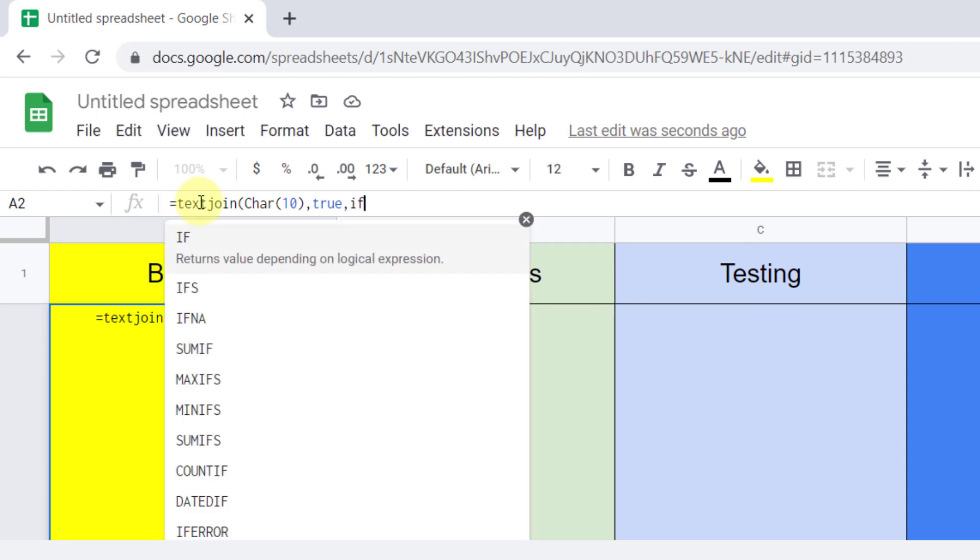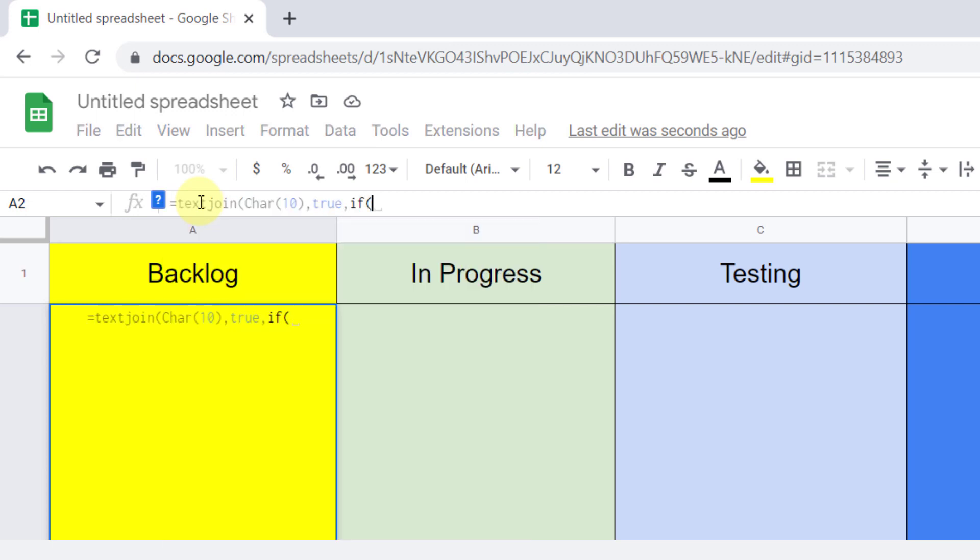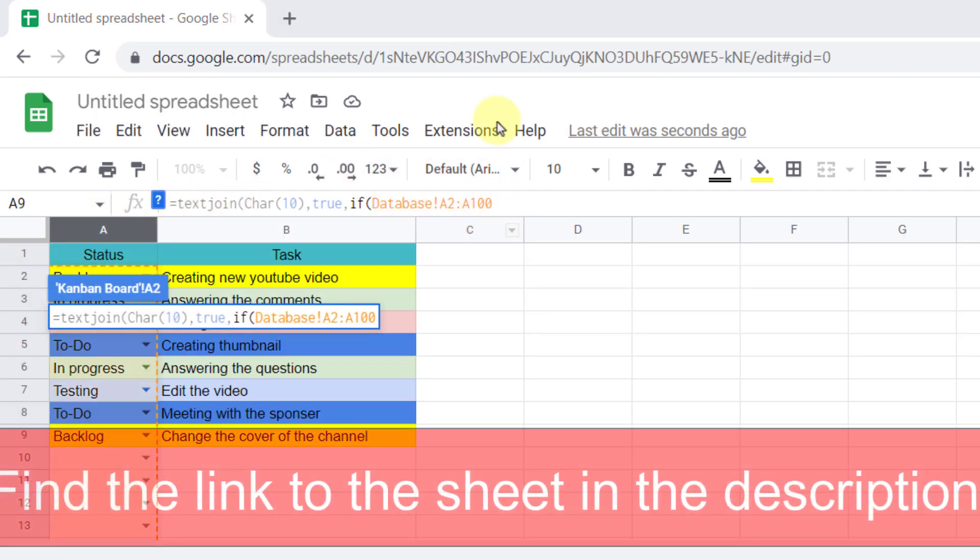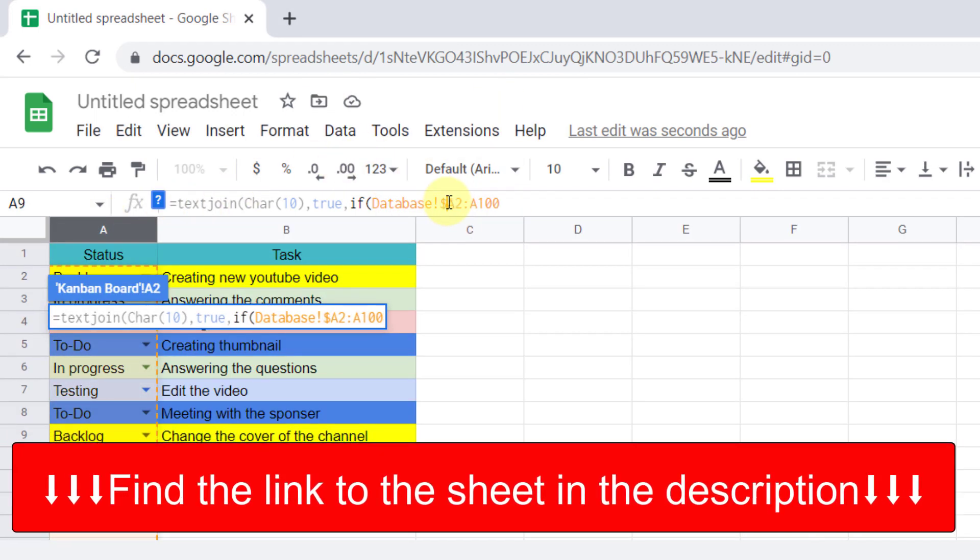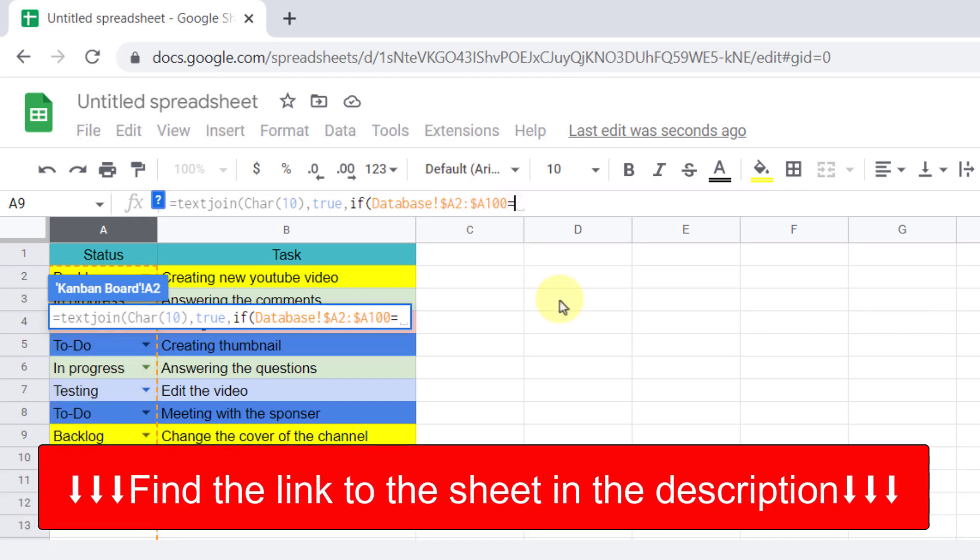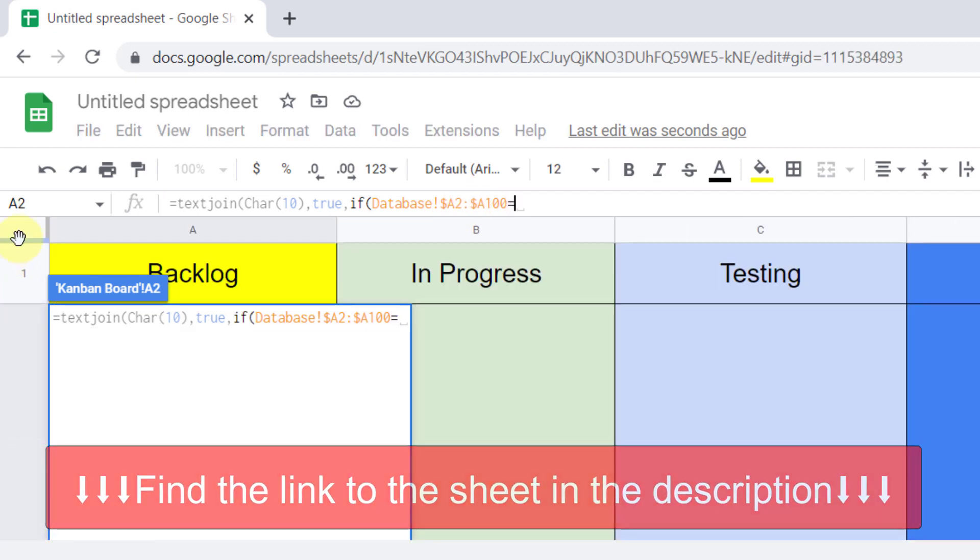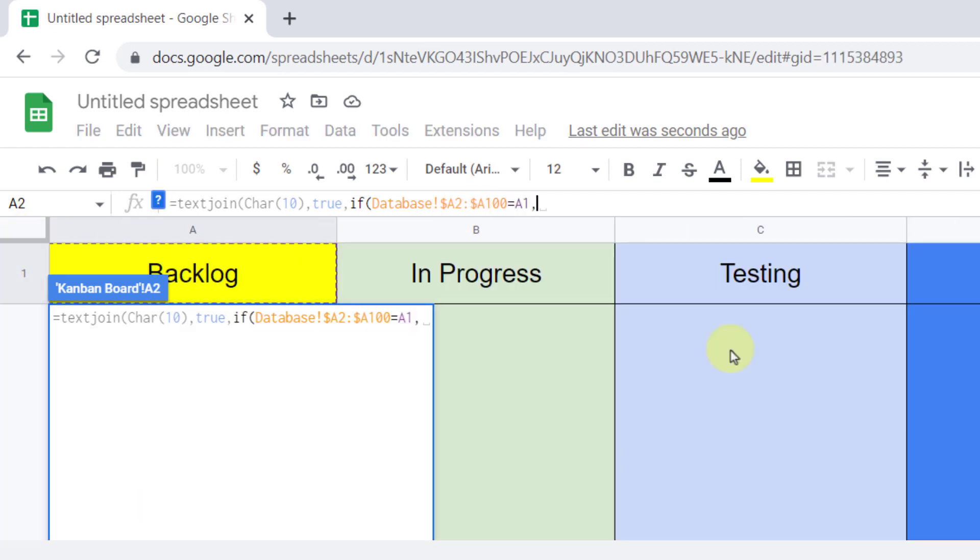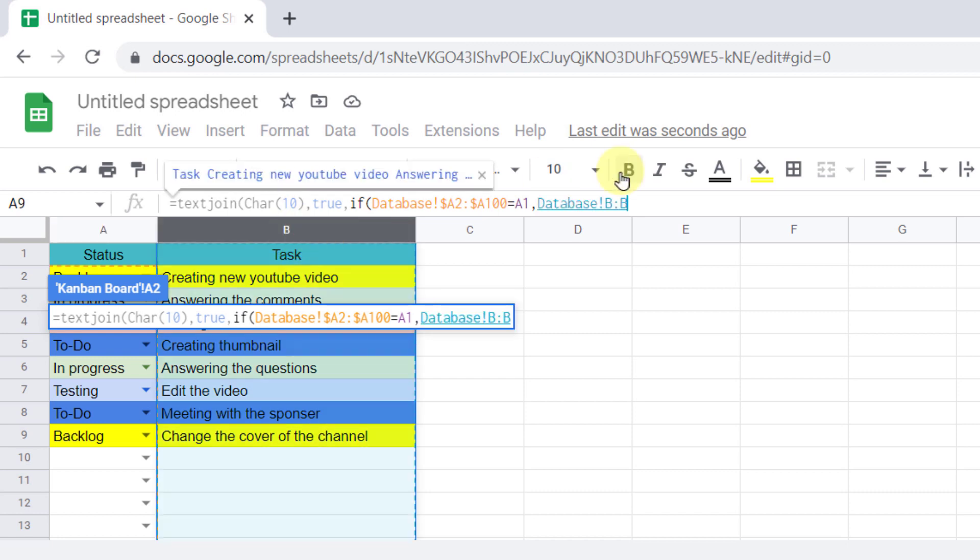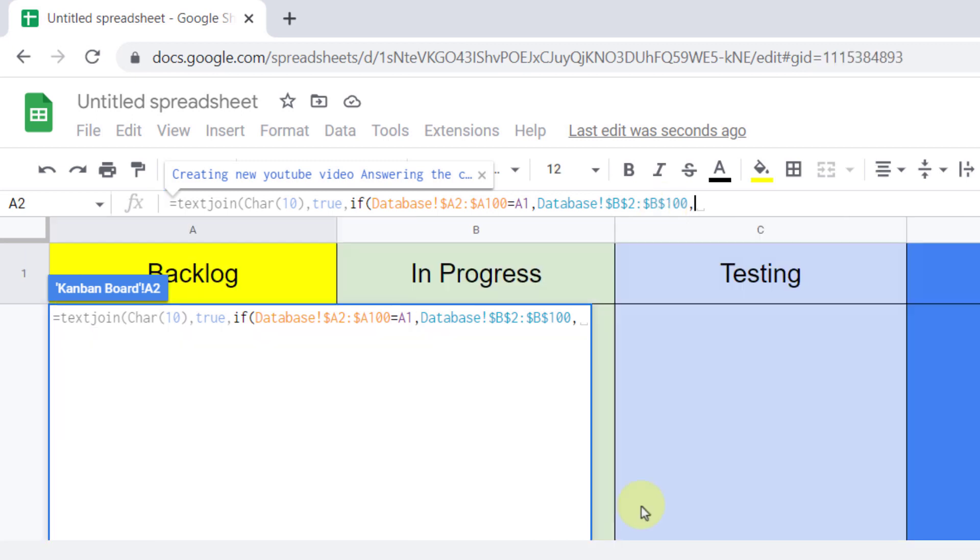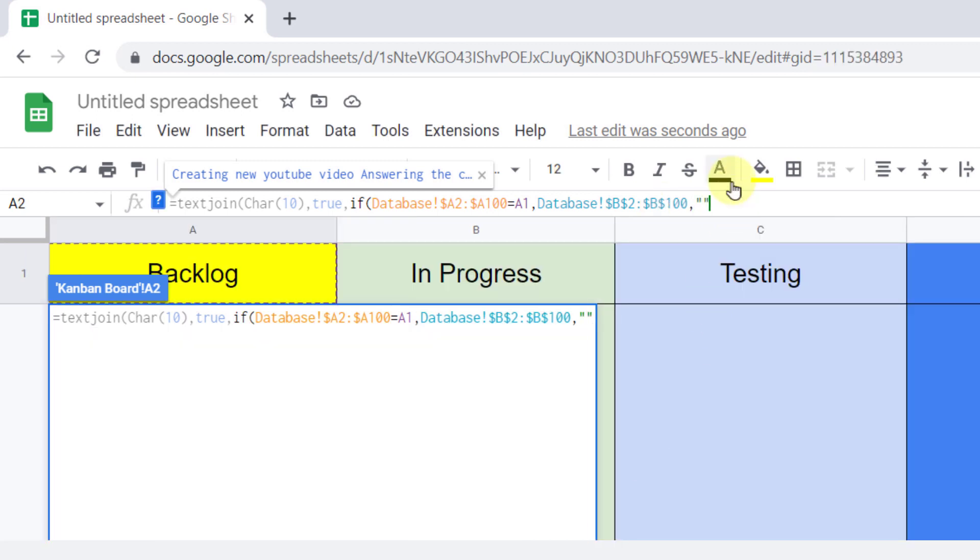So IF, open parentheses, A column with the dollar sign is equal to this cell, display column B with the dollar sign. Otherwise, display nothing. Now close parentheses.